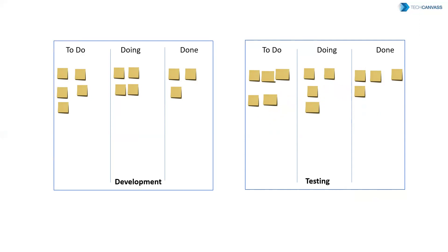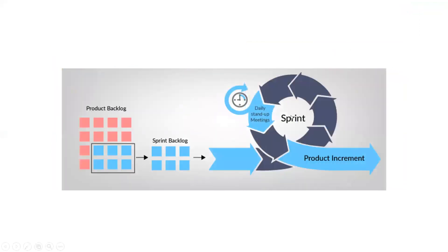Once testers are done with their user stories, they can pick up from the developed user stories. The Work in Progress (WIP) user stories at any point in time depends upon the capacity of the team. The development is time-boxed — at the start of the project, delivery is decided at regular intervals of two, three, or four weeks. This time frame is called a Sprint. The Sprint Backlog is taken from the Product Backlog superset, and the team decides which items need to be worked upon for that particular Sprint.